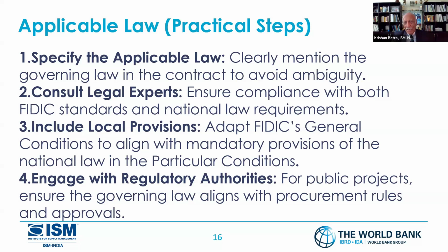Engage with the regulatory authorities for public projects, and ensure that the governing law aligns with procurement rules and approvals. That's what we need to do. Regulatory authorities have some requirements, say on the sustainability part. FIDIC may not be giving that much detail, so you may have to incorporate that. Regulatory authorities, particularly in some countries, are very particular about labor and staff, so those regulatory requirements we have to incorporate. The regulator may say you will not buy any raw material from a certain country. There are some sanctions, so those also have to be incorporated somewhere.